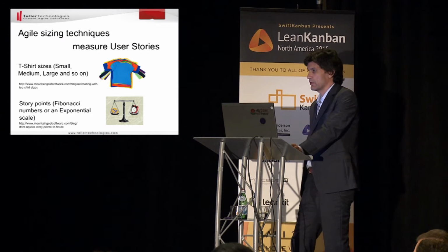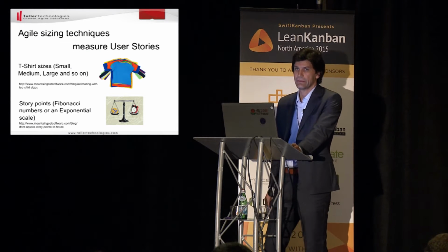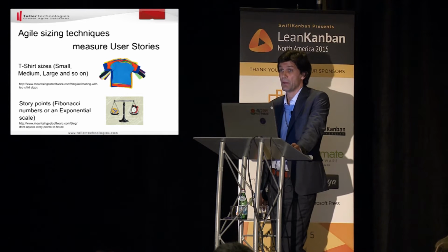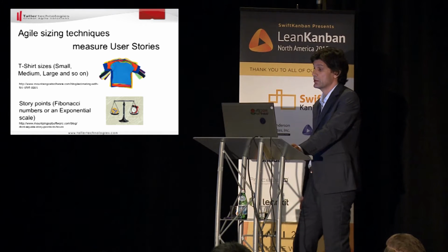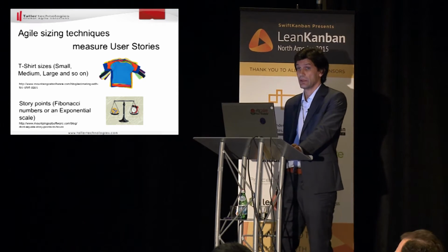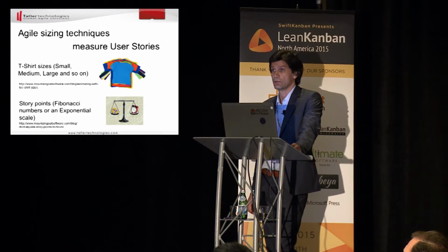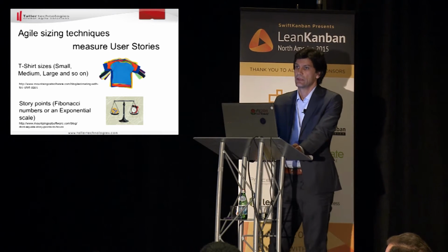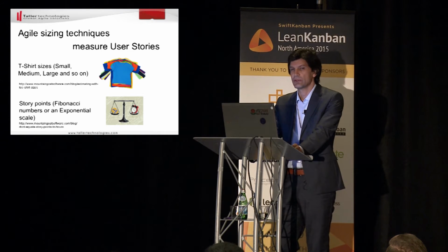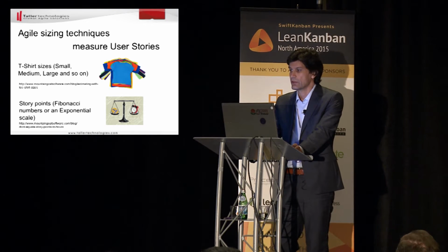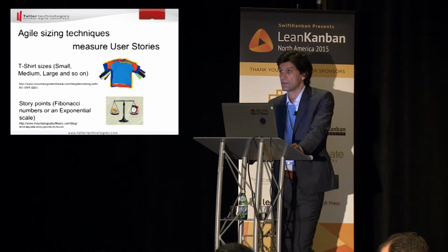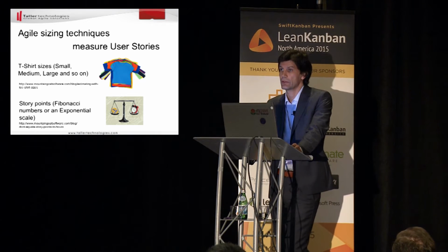When we talk about sizing, first we have to decide what units of measure we shall use. In the past, in the deep past, and I believe Barry Boehm is here, back then they measured the size of a software product in source lines of code. And later on, function point analysis was introduced, and they measure the size from a user's perspective. Function point analysis even made it to be codified into several ISO standards. So it's a standard way today, especially with DoD projects.